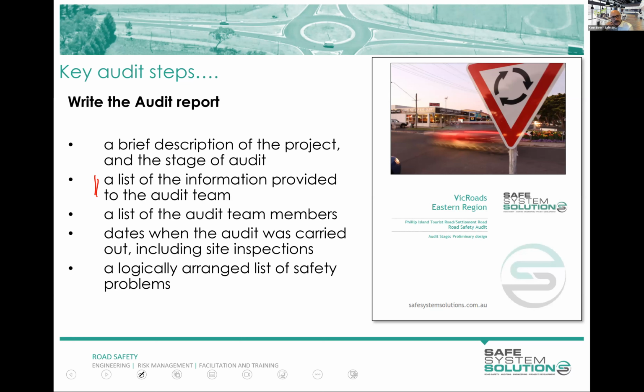One of the things I'd say is not well done is recording the design number and this date. The reason it's important is because you will audit at a particular point in time in the development of the project, and it will change. It's important that there is an understanding of what was looked at in this audit.